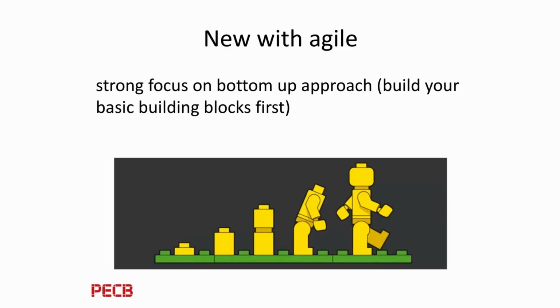And by combining those building blocks you can create more functionality, more features, and enhance the set of building blocks as you go along on a demand basis. So if you don't need it in this cycle, don't build it, because you need your time to do other stuff. Things that is completely different or the opposite of the security framework approach.